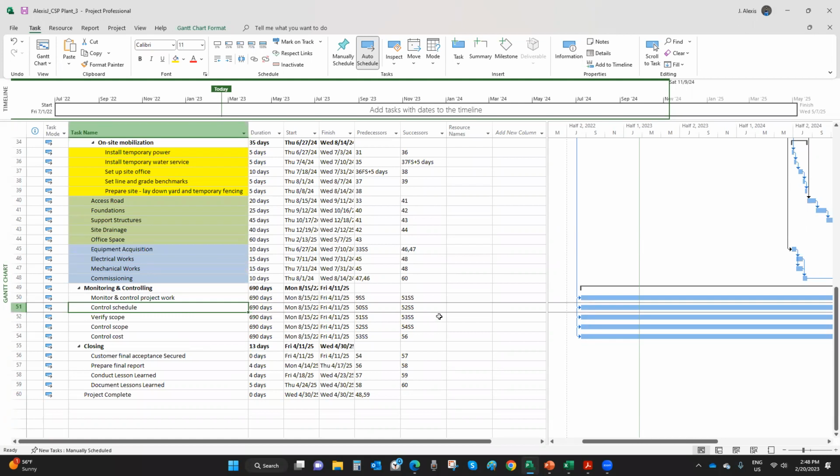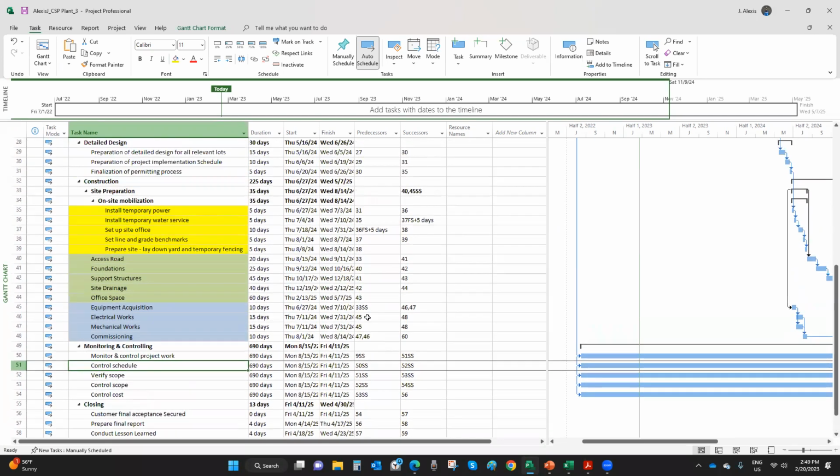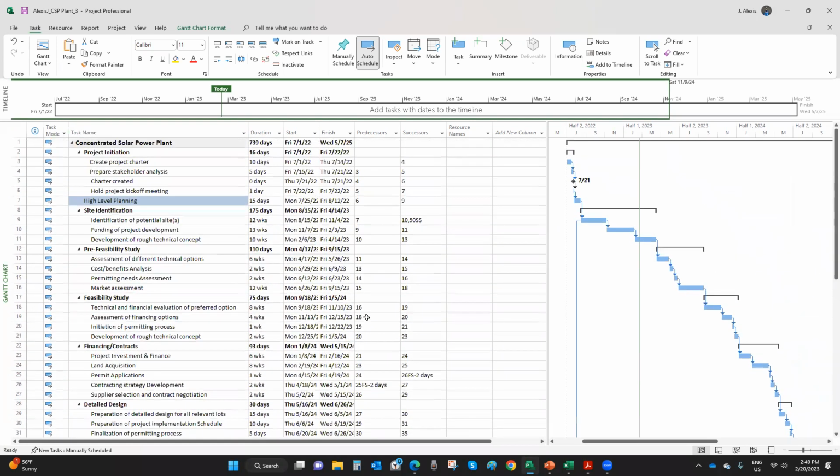Okay. So, yes, Professor. Another one was me. Could you please explain again how to put relationships to summary items, like monitoring, closing, summary? Okay, sure. When you're linking summary items, you don't link them directly because this may create some sort of double counting in terms of adding things together.